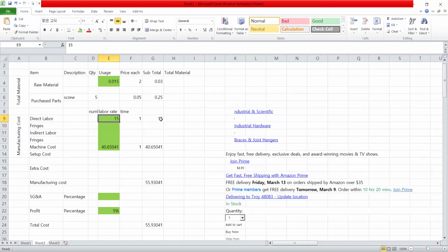And that is the cost engineer's job, to find out that, hey, the labor market says $15, why are you putting $18 or $20? Not necessarily that they will accept your challenge of $15, but if they are putting $20, they will come back to, okay, we are charging $16 or $17 because you did not consider ABCD factors or EFG factors, and we realize that some factors we missed. So we will not let them charge $20 per hour, but we will make it somewhere $16 or $17. So these are the activities we do on a daily basis.